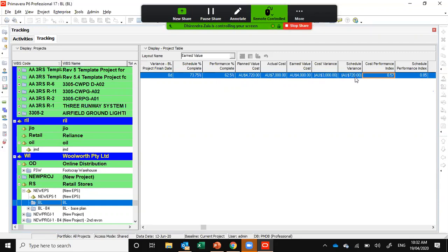So you're getting a 720 as a schedule variance. Schedule variance will only appear once you are working on an activity. If there is no working or ongoing activity, it will be zero. CPI is earned value divided by actual cost, and SPI is earned value divided by planned value. Sorry, my mistake on the earlier wording.